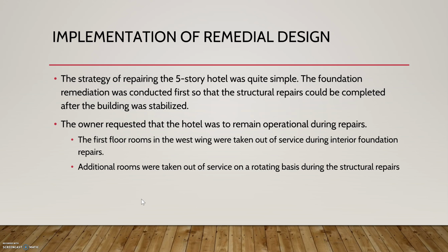So the implementation of remedial design. So the strategy of repairing the five-story hotel was quite simple. The foundation had to be completed first, so the structural repairs can be completed afterward. The owner requested that the hotel remain operational during repairs. So the technique used to do this was to make the owner happy.